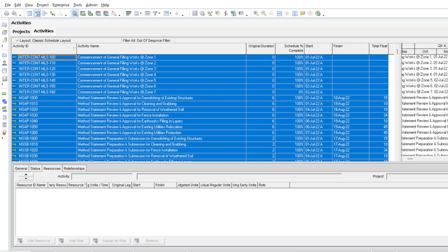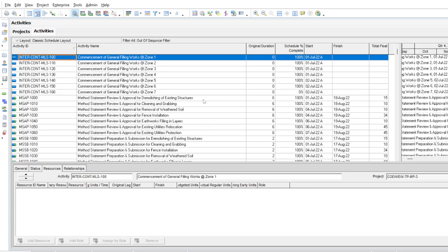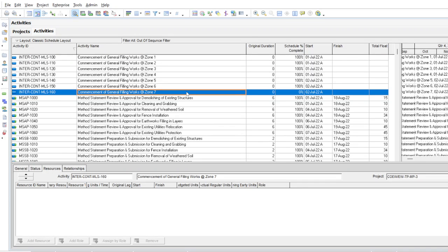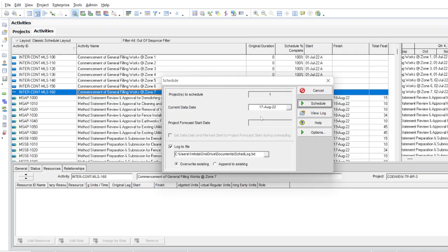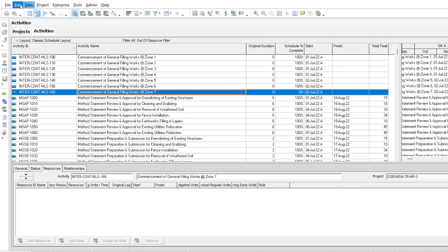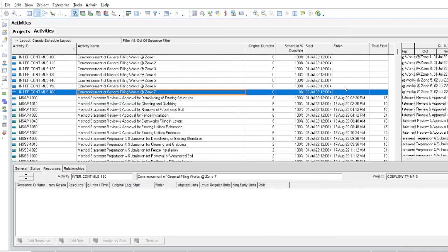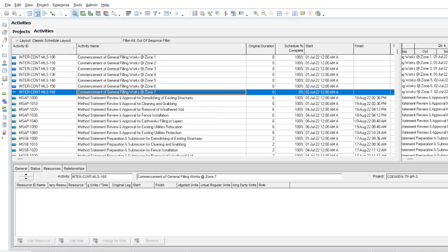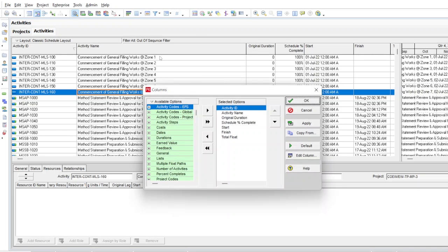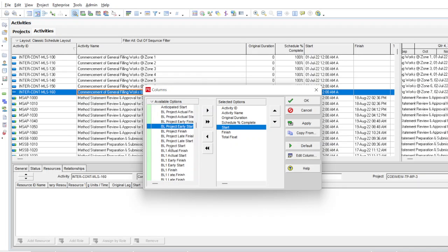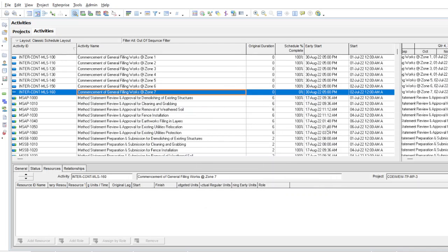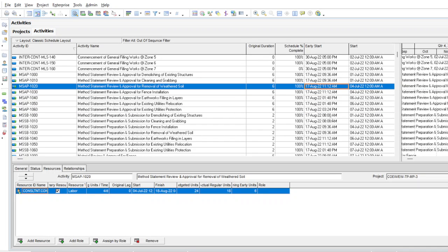We go to Primavera again. If you go in the program and run the program, press F9, you see that our data date is 12 August. We see this is mainly because of timing issues. So we go and show the time here. You see a lot of activities here, and we show the column for early start. Now this is our early start column, and we see that some activities have 11 August and 8 o'clock in the morning. See this 8 o'clock in the morning.